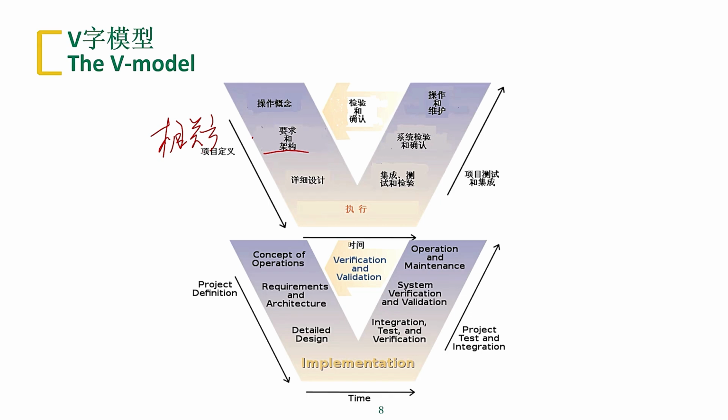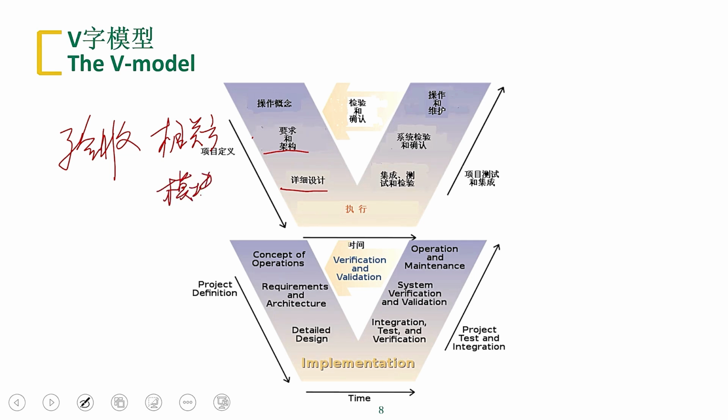Here I need to emphasize one point, which is acceptance. The standard for acceptance is actually set in the planning stage. That is, we need to be clear when we collect requirements or when we design in detail. It's not that I need to consider the acceptance standard in the later testing stage. No, it's in the early stage. That is, when we are planning, even before a piece of code is written, we need to consider its acceptance standard. So we need to understand this. Once we have the requirements of stakeholders, then we enter the detailed design.